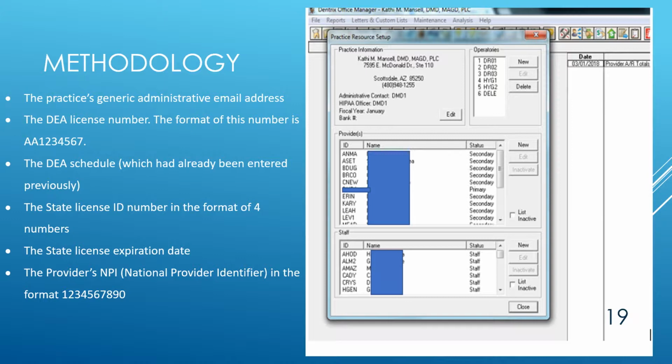Discovering this gave me pause to inform the dentist and to obtain her approval before proceeding. As previously mentioned, the practice writes very few prescriptions, and all are for non-controlled substances. The initial setup cost of $150 plus additional subscription costs of $35 per month were something that the practice was not willing to take on based on the light use that the module would get once implemented. The difficult decision was made to halt the project.